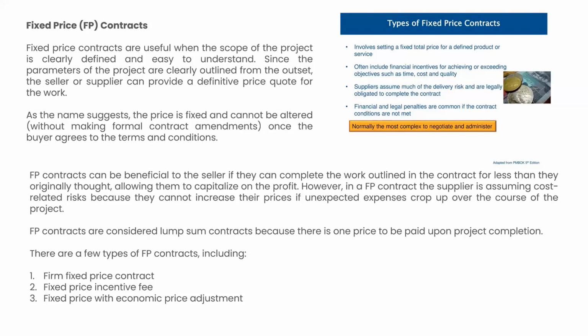So if all these factors are clearly defined at the start of the project, we can clearly fix the price for each and every resource which the contractor provides to the organization. That is fixed price. The price won't change for the duration of the project, even if in the market there may be price fluctuations of the raw materials. Either the prices can go up or come down. But since it is a contractual agreement where the price is already fixed for the entire project.